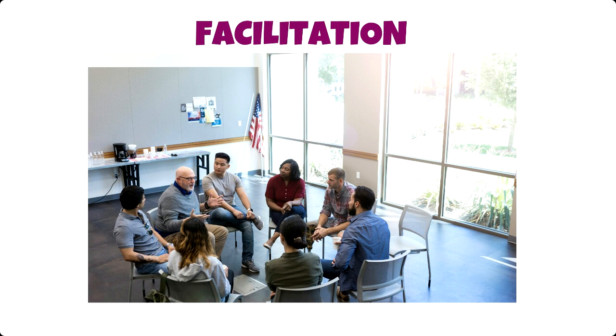And if it's not you, if you're a team member that wants to have a retro, even if you've planned the retro because you know what the team needs, and even if you have come up with a great plan, find somebody else who can facilitate it so that they can be neutral and you can participate fully. It's really important to have that neutral facilitator, someone who's not tied to the individuals or the specific outcomes, but just to getting to an outcome that is great for the team. So that's the first thing.